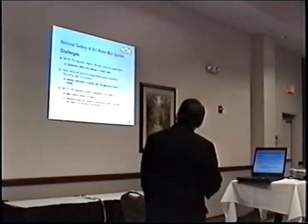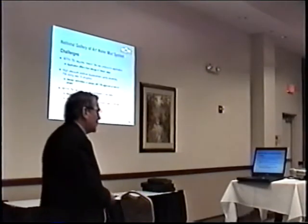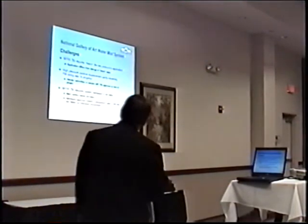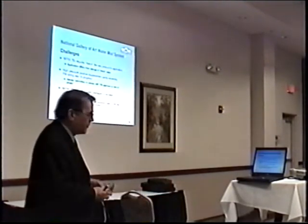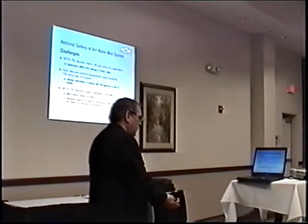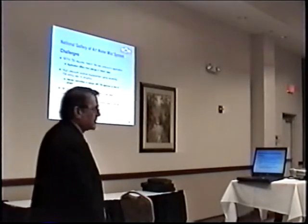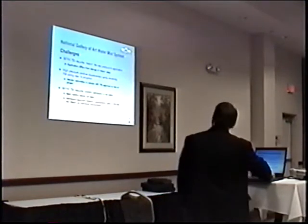High pressure positive displacement pump assemblies. Marioff, the company from Finland, said, well, we have the system approved by IMO on ships, but we don't have an FM approval on the system. But we'll get it. So they said they would commit fully to getting their system and their controller approved through Factory Mutual, so that by the time the project was done, the approvals would be there. And if by some chance what they installed did not meet the approval, they would, at their expense, fix it. And that more or less worked.